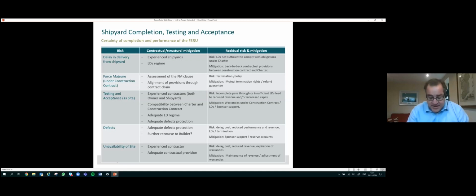Ultimately, should there be a significant delay in the construction process, there will be a right on the part of the FSRU sponsor to terminate the construction contract. In such event, the project company will either have the right to request the FSRU sponsor to maintain the construction contract, and delivery of the FSRU under the charter will have to be commensurately extended, or the project will have the right to step into the construction contract in place of the FSRU sponsor to enable the project to take, albeit delayed, delivery of the FSRU from the builder should it so wish, at which point the underlying charter would terminate. However, the FSRU sponsor needs to be very wary that termination of the charter as a result of breach by the builder or extended delay does not in itself entitle the project to have a claim in damages against the FSRU sponsor for breach of the charter.